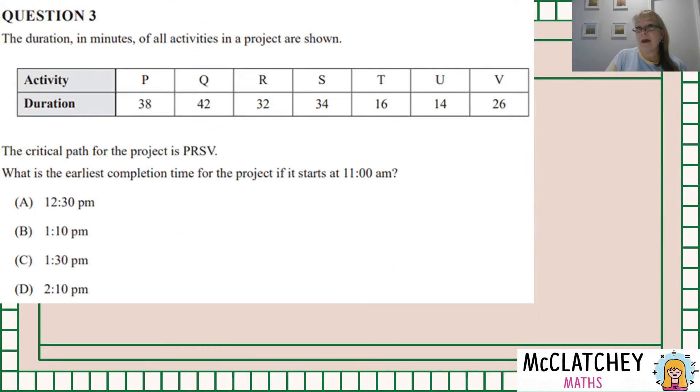This is for decision mathematics. Our first question, question three, the duration in minutes of all activities in a project is shown. So we've got seven activities, P, Q, R, S, T, U, V and their times that they took in minutes underneath. The question says to us the critical path of the project is PRSV. What's the earliest completion time if the project starts at 11am?